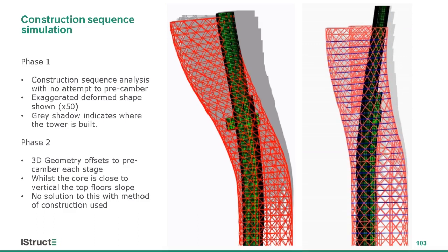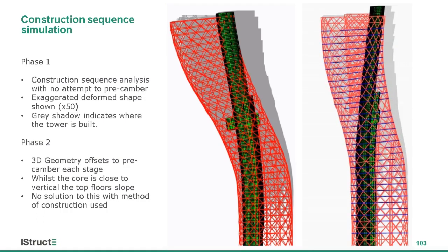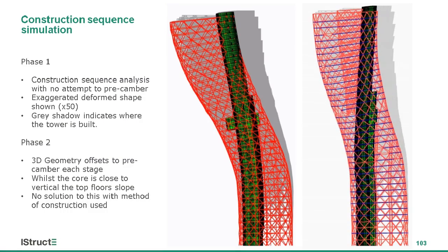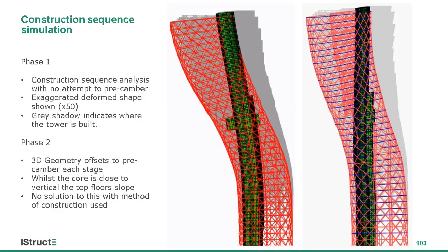The other thing I should say is that the whole process was automated, because we ran the construction sequence based on the original construction drawings, but we knew once the contractor had started to move on this that he would probably want to change that as his experience grew, or would have other ideas. And so we ran these quite a few times.